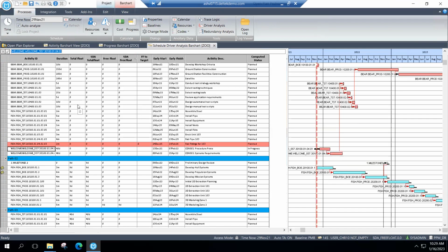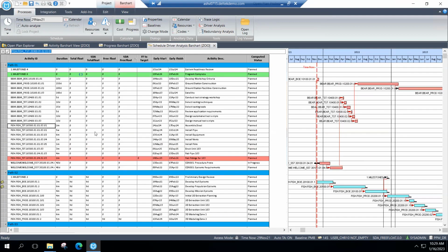and then export back a copy of this, this is what it looks like now that we've incorporated everybody. So I can go back and open up my little Microsoft Project schedule, just that little piece of it, go ahead and export that back out as a Microsoft Project schedule and send it back to my subcontractor and say, hey, once we put everybody's stuff in here, it looks like you have an impact. So we obviously need to get together and have a conversation to see if there's something we can do to mitigate the impact, both on the other subcontractor as well as the programmatic milestones. And then obviously, again, it's an open plan, and we know we're going to have an open plan session later if you want to come by for that this afternoon.